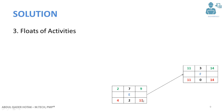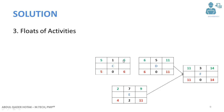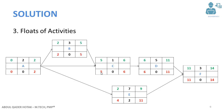For activity E, the late finish will be 11; subtracting its duration gives a late start of 4. For activity D, the late finish should also be 11 — you cannot delay it more than this, because if you delay it you will delay activity F. For activity C, the late start of activity D (which is 6) becomes the late finish of activity C; subtracting the duration gives the late start of activity C. The same approach applies to the remaining activities.